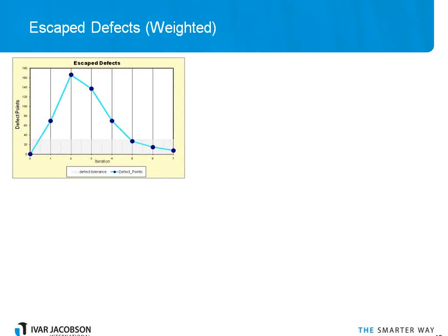If we're going to have production quality every iteration, then we should be within that tolerance every iteration, because with more than that, it's not clear cut that the software will be released. I would encourage people to have a zero tolerance for defects. This idea of defect points is to give a weighting to defects. So a priority 1 scores more points than a 2, than a 3, than a 4, than a 5. And again, this allows those showstoppers to appear and push you above your tolerance.